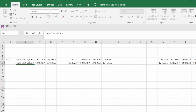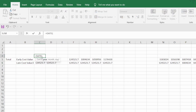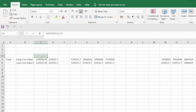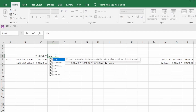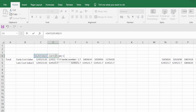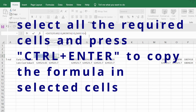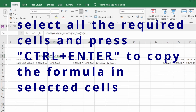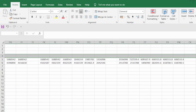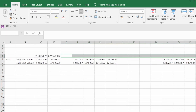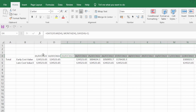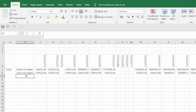Add a date column. Enter the first date — for example, 1st July 2022 — and drag it down or use Ctrl+Enter to fill. For the daily cost values, set up a formula so each day's value references the corresponding daily cost from the pasted data. Copy the formula across to the end of the project using Shift+Ctrl+Left Arrow to select to the last value, then press Enter to apply the formula to all cells.